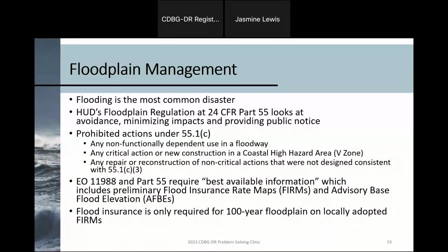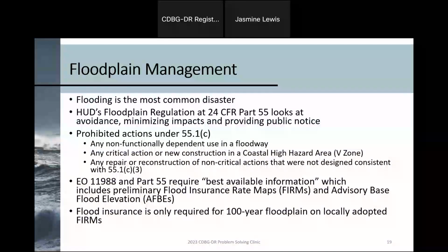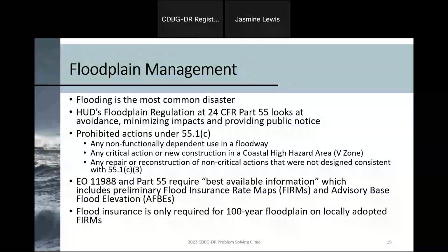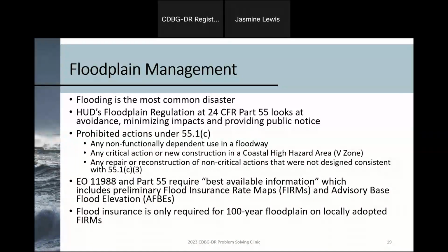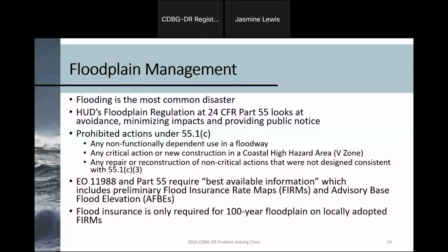From there, you want to determine the appropriate agency that you work with in order to establish your programmatic agreement. So if you're trying to address something with historic preservation, you're going to be working with your State Historic Preservation Office, or for endangered species, U.S. Fish and Wildlife. That starts an early consultation process and communication of how to articulate your program to them, to determine what you may be able to establish in order to really expedite that process.